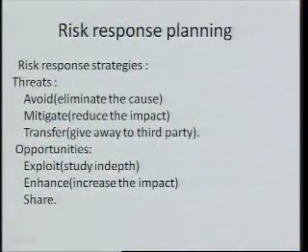The other type of risks that we discussed is of the type opportunity. So the risks that are positive in nature and that are giving new opportunities to the business processes, getting more business, such type of risks, you have to first exploit them. You do not avoid them, you exploit them, on the contrary. So whatever is done in the threat part, exactly the opposite is done in the opportunity type of risk part.